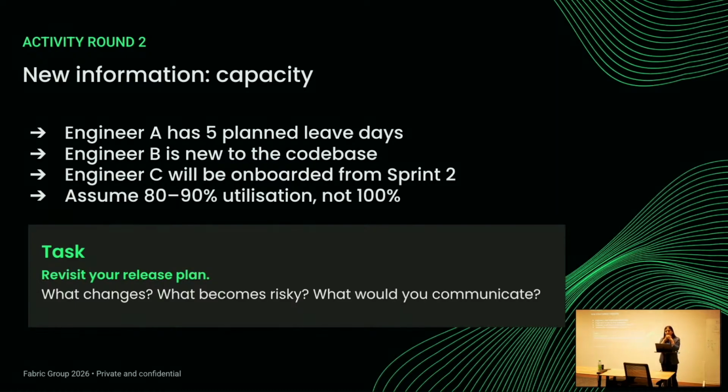One assumption I made while doing this exercise was that since we were underachieving in sprint one, which was the case anyway, we should overachieve somewhere. I don't think that was a good idea. We discussed with the team, and I realized it is always better to run at 80% of the availability capacity, rather than going 150% as I was planning. It is always better to underestimate at times than overestimate, because that gives more confidence that we can achieve it and there will not be any problem.